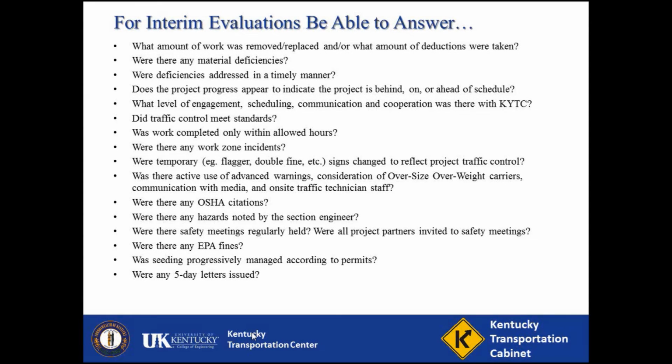The next list is the interim or year-end set of questions, which is a bit shorter, but some examples include: does the project progress appear to indicate the project is behind, on, or ahead of schedule? Were there any hazards noted by the section engineer? Were there any EPA fines? Were any 5-day letters issued? And so on.